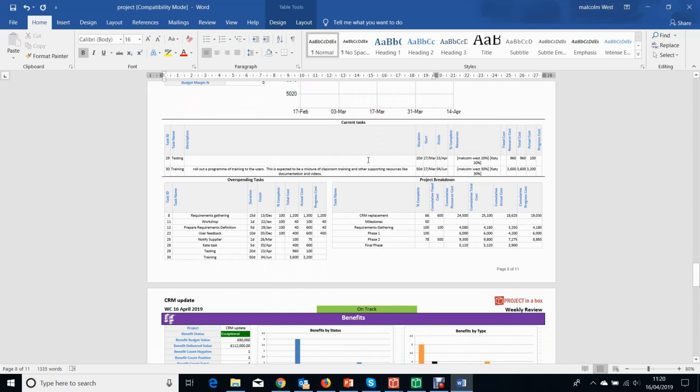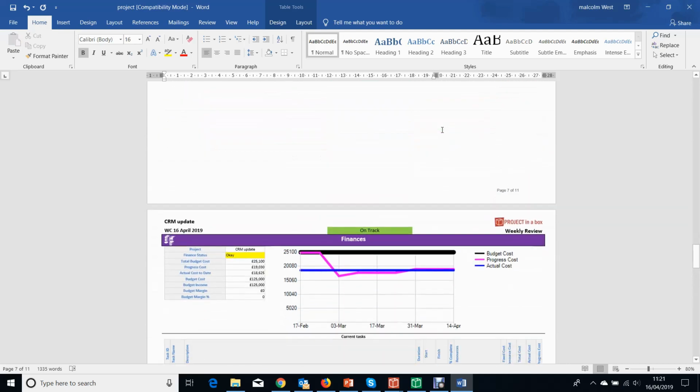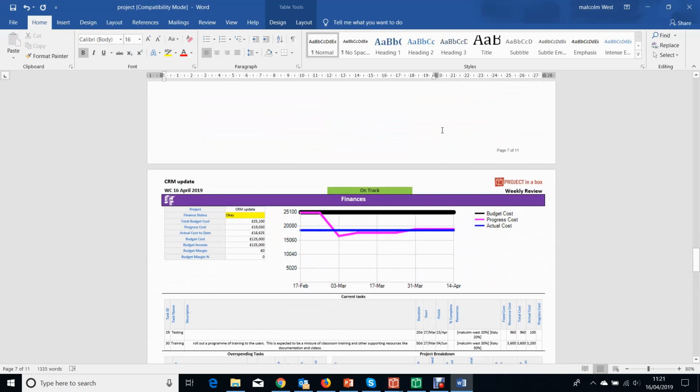And then we're looking at things like what's the spend information on the current tasks that are active, overspent tasks in this project plan, by using those filtering rules to identify ones that have spent more than the original budget was, and again that sort of summary roll up by groupings for the project looking at costs. So all that data is there, and you can run analysis to come back and get the particular things that are of interest to you straight into a report like this, alongside all the other sorts of information. And Planner is assembling all the information like that for you. You've just got to go through and put percentage completes and actual times against it, and you're going to have then all this stuff available through into analysis and reporting when you want it.